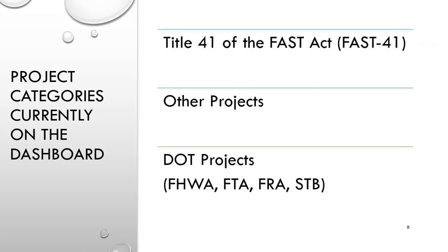Federal Highway Administration is the lead federal agency for the majority of bridge projects that require Coast Guard bridge permits. However, it's important to remember that the Coast Guard issues bridge permits for all modes of transportation, including highway, railroad, pipeline, pedestrian, conveyor bridges, and we've even permitted a couple of zip lines that have crossed waterways.